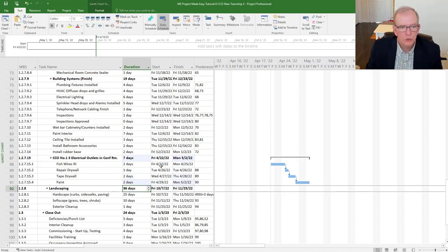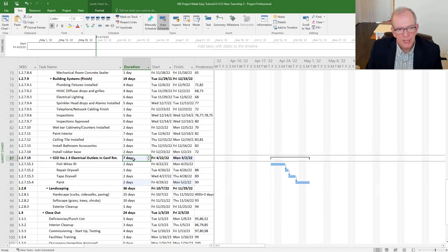Okay, so I put in my durations overall, and because they're sequential, it adds up to 7 days. And remember, this only ever counts working days, so it's not counting Saturday and Sunday. If you're counting Saturday and Sunday, it would be 11 calendar days, but it's showing 7 working days, so not counting 2 Saturdays and Sundays.